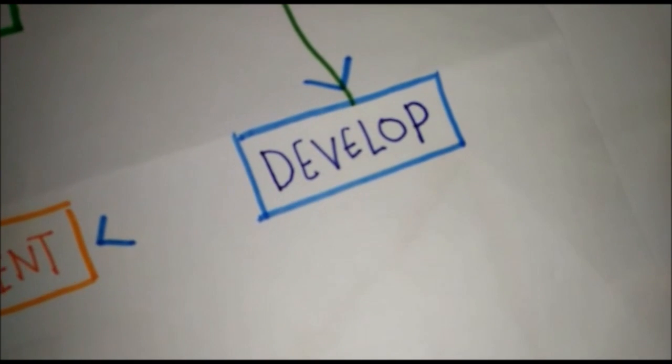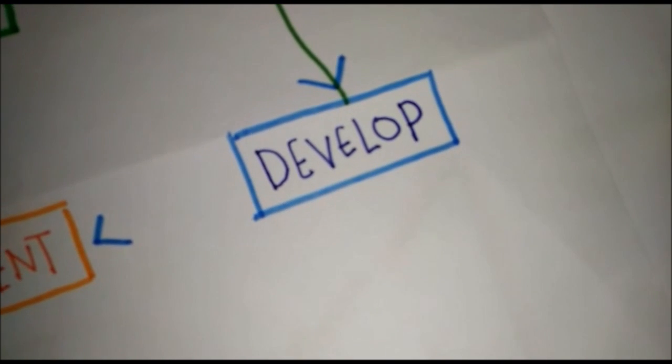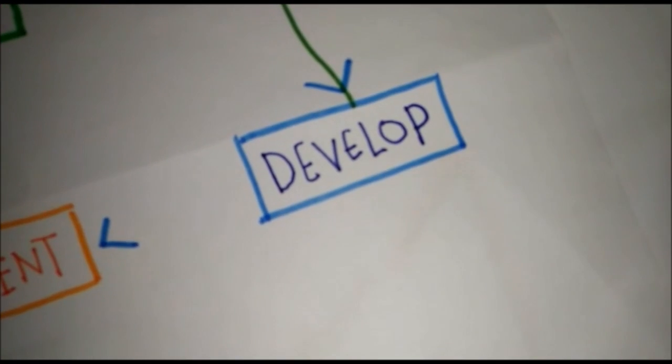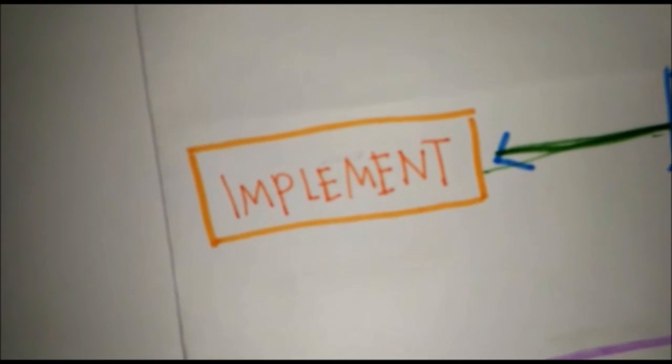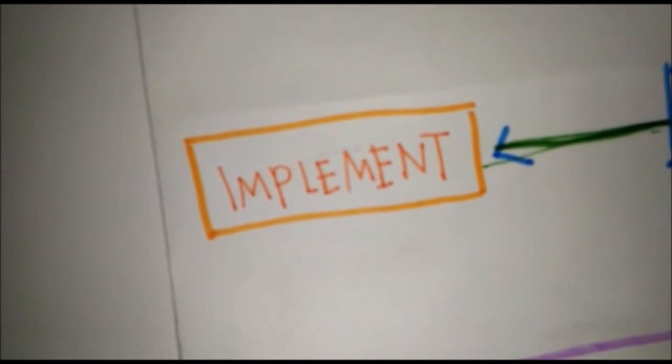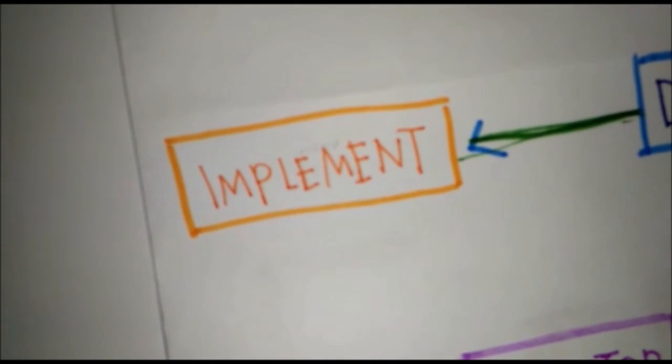Fourth is transfer or sharing. Purchase insurance or transfer the risk to another organization through signing a contractual agreement. Next is implementing. When you have decided which risk management strategies will be the most effective and affordable for your organization, clearly outline the steps and who is responsible for each step in the risk management plan.